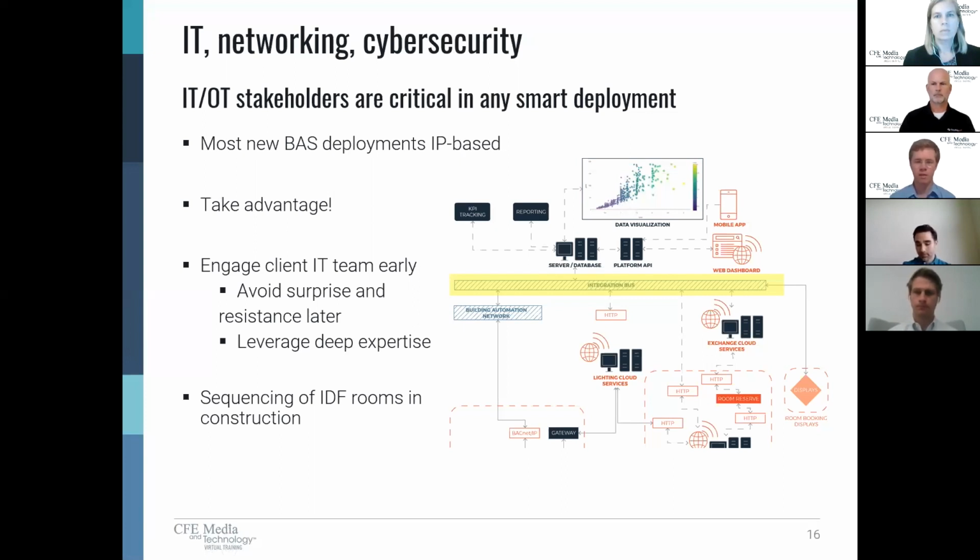So get them involved early, because if it just kind of becomes an afterthought until you're moving into construction, now we have to talk to the owner's IT team, they're going to be surprised, and you often get a lot of resistance. What do you mean you're going to plug this thing into my network? I can't allow that. So getting ahead of all that and leveraging their deep expertise can save you a lot of time later down the road.